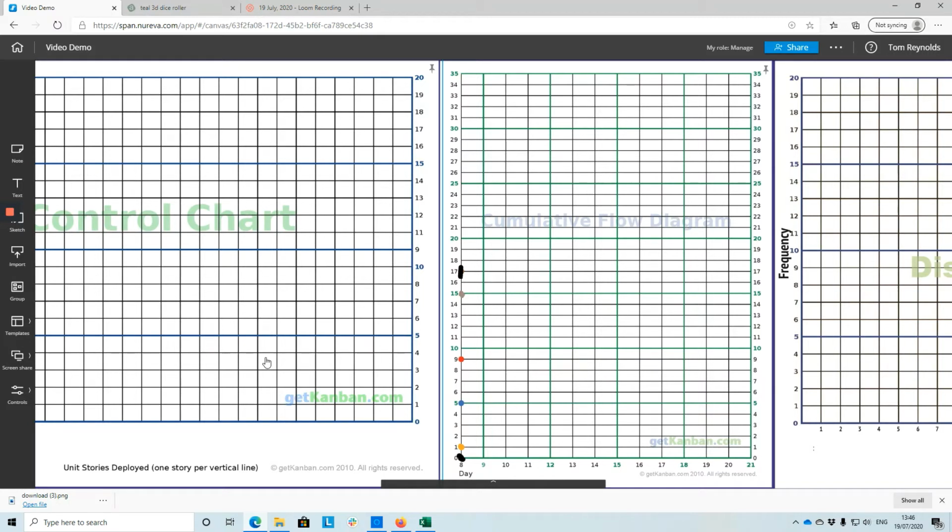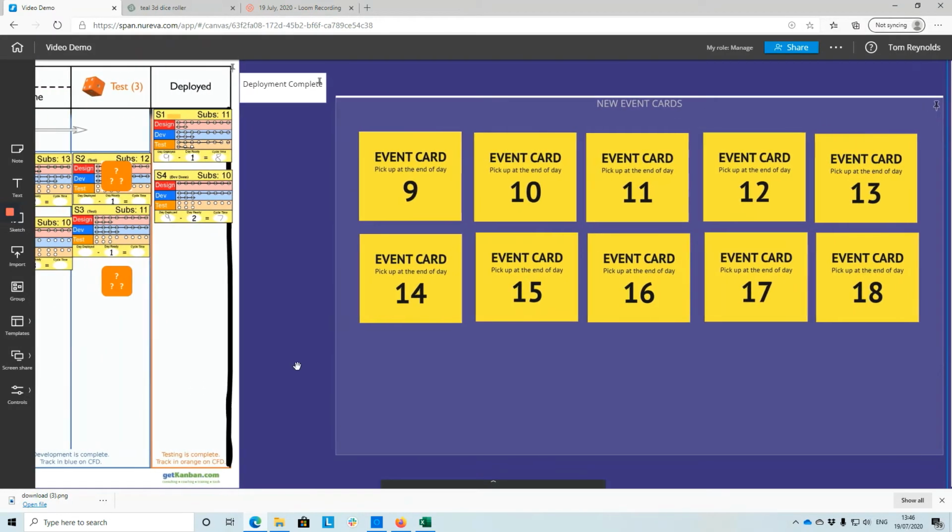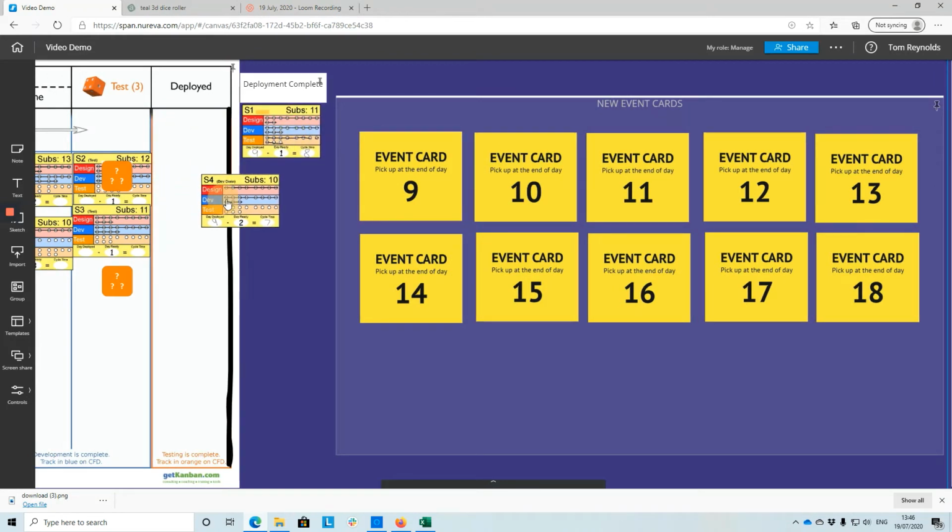So we have a number of tickets that have gone past the black deployed complete line, past test at 1, past development at 5, past analysis at 9, and into the system at 15 on brown. So we plot this every day. This is a cumulative chart. So if we now look at, let's say, our position on our dummy game here, we're going to deploy them tickets. So they're going to move across the deployment complete.